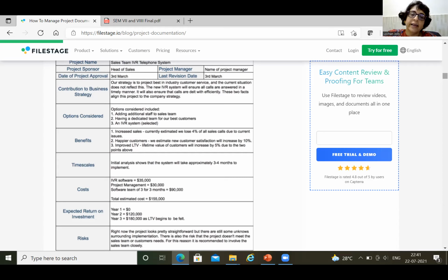The project was ready, and when they went there, to their surprise, they hadn't taken into consideration the size of the screen that would be scanning the QR code. They had made the app taking the biggest mobile screen size into consideration, and what they found was they were given small mobiles in which the QR code itself was not fitting.